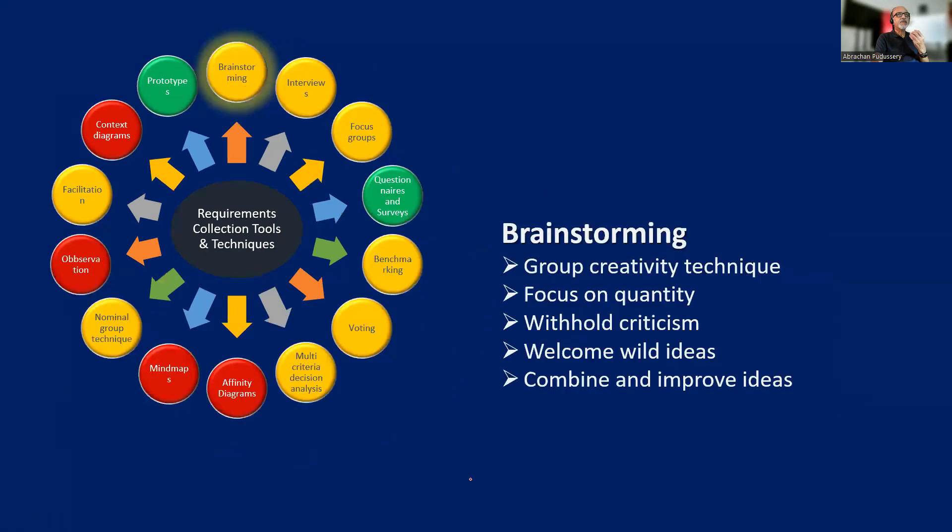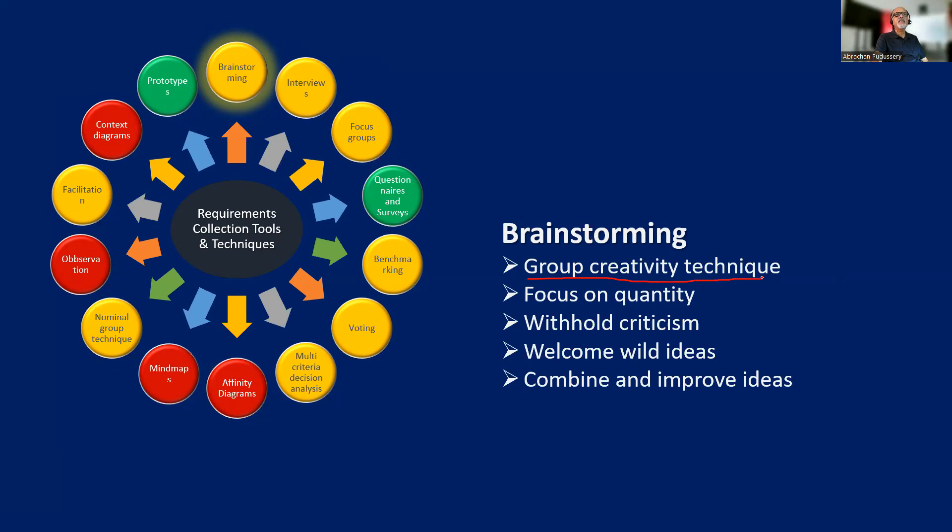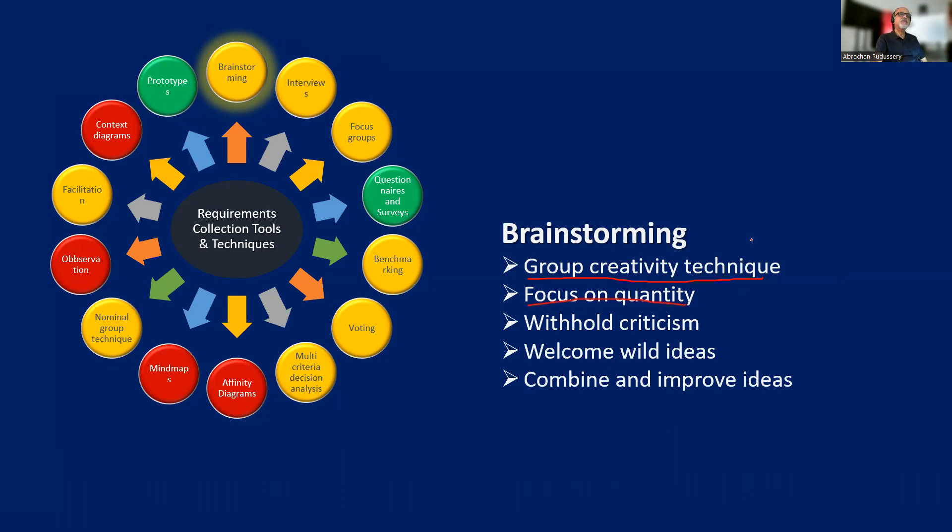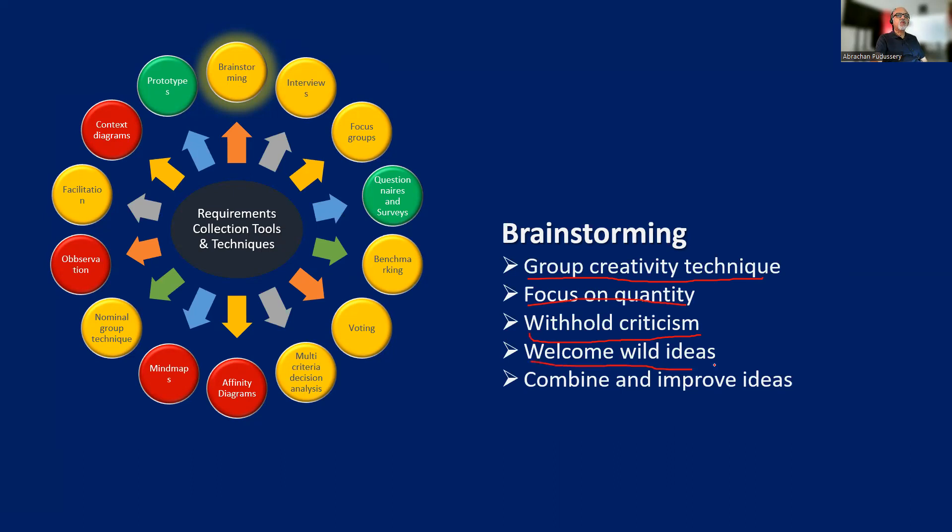Now brainstorming. Most of us are familiar with this. It is a group creativity technique. The focus is on quantity - creating as many ideas as possible. We are not that focused on quality of ideas. Our focus is on generating as many ideas as possible. And while performing brainstorming, we withhold criticism. We don't validate the ideas while doing the brainstorming.